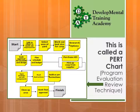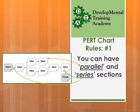Notice that there are arrows all the way through linking one thing to the next. There are four rules with a PERT chart. The first one: you can have both parallel and series sections. A parallel section is when you have multiple activities occurring at the same time. This is used for shortening a schedule on a project — or crushing a project, if you want to get technical. The other sections are what we call series, when one thing happens after the next. The beginning and the end of this example project are both series PERT chart sections.